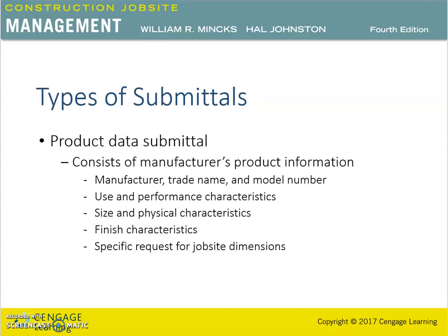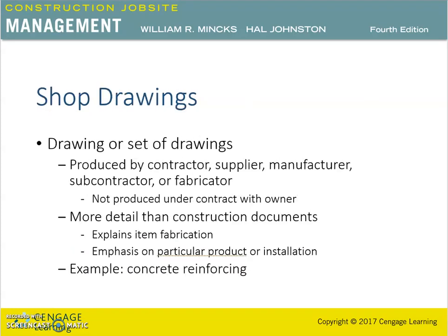Okay, next let's talk about the shop drawings. The shop drawings are the drawings which are produced generally by the contractor and other parties such as the suppliers, manufacturers, subcontractors, or fabricators. So you can see that the shop drawings are not those drawings which are produced by the architects and the engineers. Those are the construction drawings, and they do these drawings under their contract with the owner.